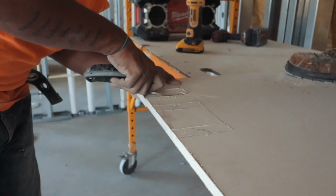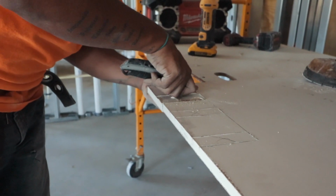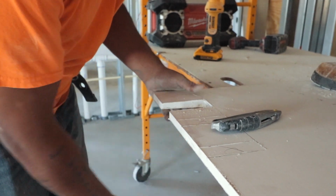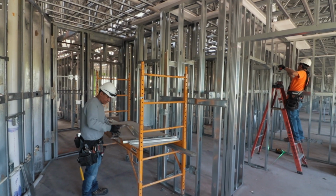And we are actually gonna be starting drywall. The guys stocked it on Friday and Saturday. So we're gonna rock behind the tubs for our 1 hour rating between demising walls. The plumbers are still going at it.